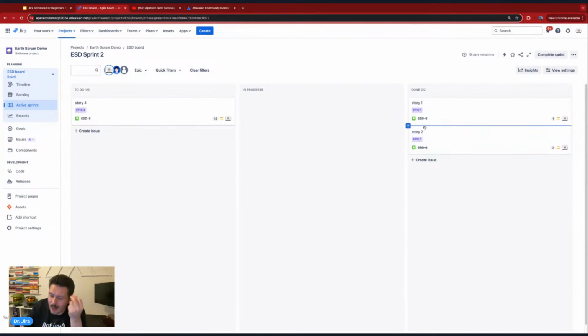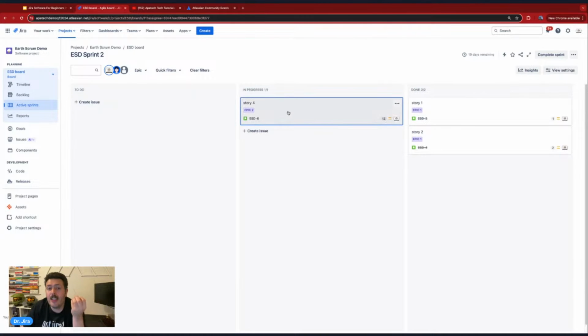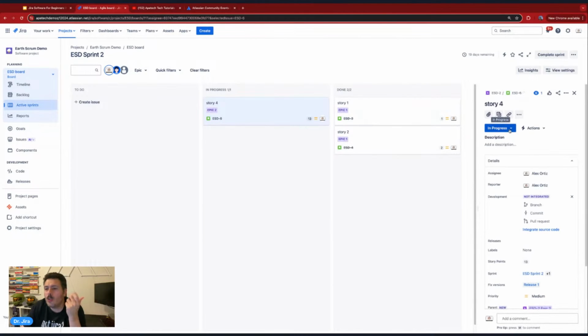And really, it's the critical part. This is really the part that almost everybody drops or forgets, because Jira is useless if you don't update the statuses. And I think Ronnie has a shirt that says, have you updated your Jira status today? Because this is what we talk about when we say update Jira. It's literally updating the status. And there's 2 ways to do it. You can do the drag and drop, which I like, kind of fun. Or you can do a drop down here and pick to do or done and move it around.